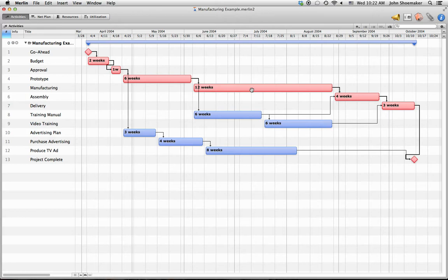Duration is the amount of time it takes from the beginning of an activity until the end. Work is the actual amount of time spent on the activity. So work takes place within the duration. Duration is always equal to or longer than the work, assuming of course we just have one person assigned to the activity. The schedule is based not on work but on duration. Okay.